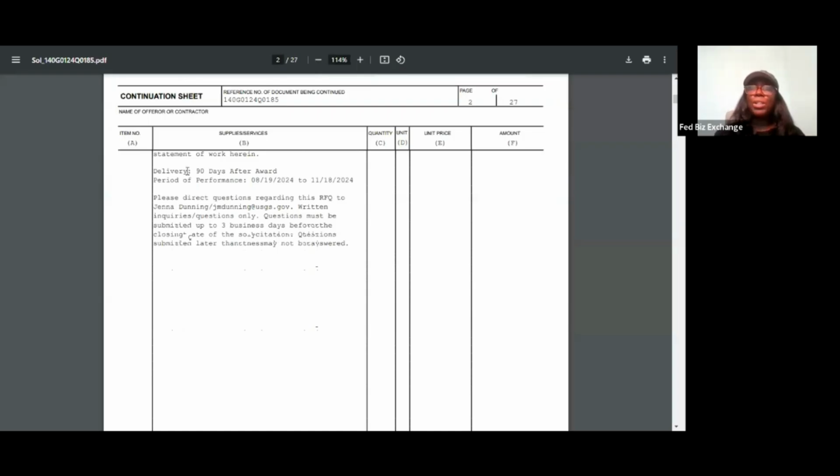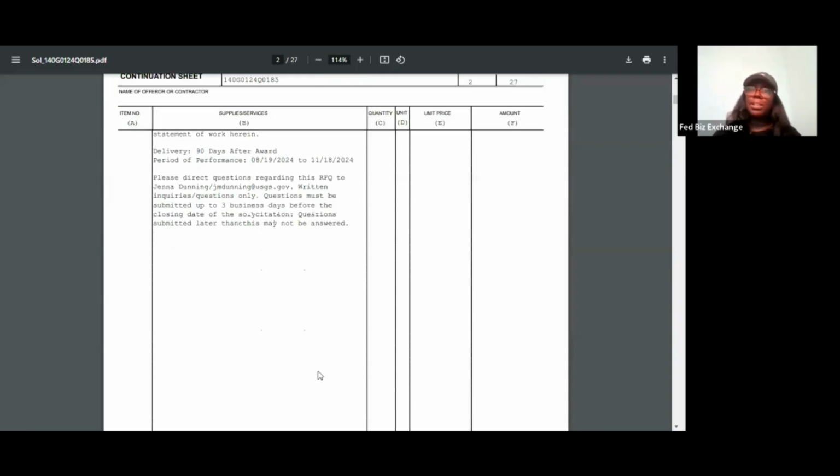Okay, sometimes they want you to give them a time limit for the pricing. Sometimes they might say, I need this pricing to be good for 60 days. You need to put a disclaimer when you do that to say, I can make my pricing good for 60 days because of the service part, but you cannot always make your pricing stay the same for 60 days when it comes to the equipment. That can change. So you need to put a disclaimer there.